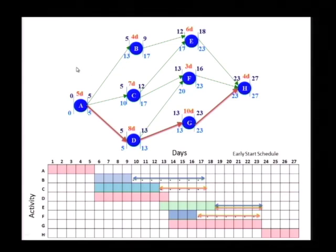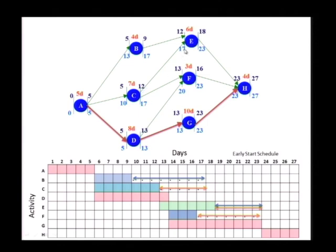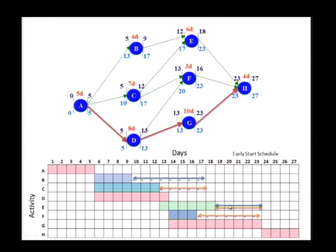Any questions — please raise them. What about C? Total float of five days. Here is C. I can move it all the way, but when I start moving C, what happens? Does it have any free float? No, it has no free float, because the minute I move C to the thirteenth day, E will start moving. You can see that in the bar chart — here is C and E starts right here. The minute I move C by 1, E will also start moving by 1.